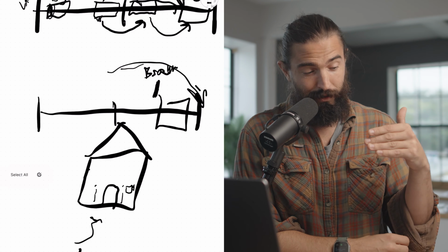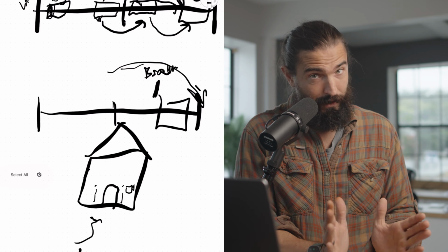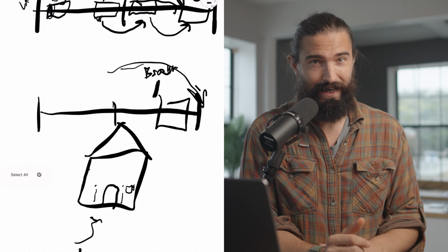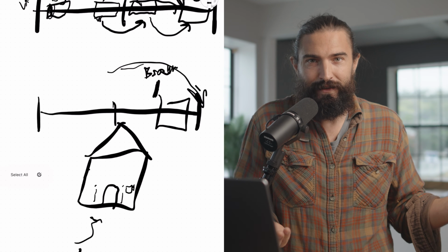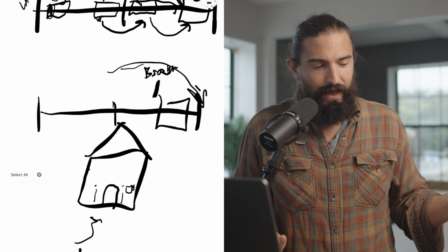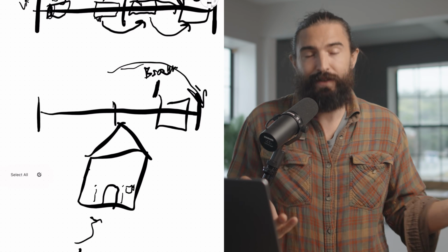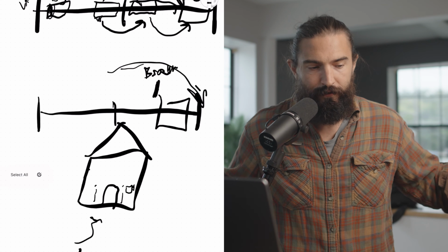You're going to send a bottom of the barrel guy because this guy needs no skills. So he's probably $200 a day, right? And it's going to take what? I could personally get that done in a day, but let's give him 2 days. Excuse me, he had to do the floor insulation as well. So that's going to take another 2-3 days. Now I have 5 man days, $200.